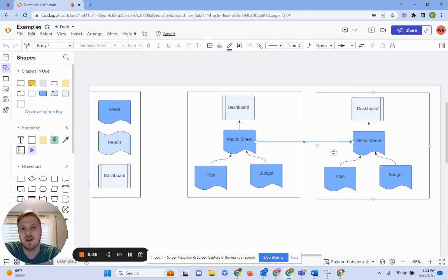The only caveat is that when you set up a form and you have a special form link, that is not going to get duplicated with it. So if I were to have a form to submit to this plan, and I were to have that separate, that is not going to get duplicated. So maybe I would have it like this and it would go into this plan. When it gets duplicated, unfortunately, the sheet would have a new form, but that link would stay with what it's attached to. So you'd have to make sure that you're always bearing in mind any forms that you make.